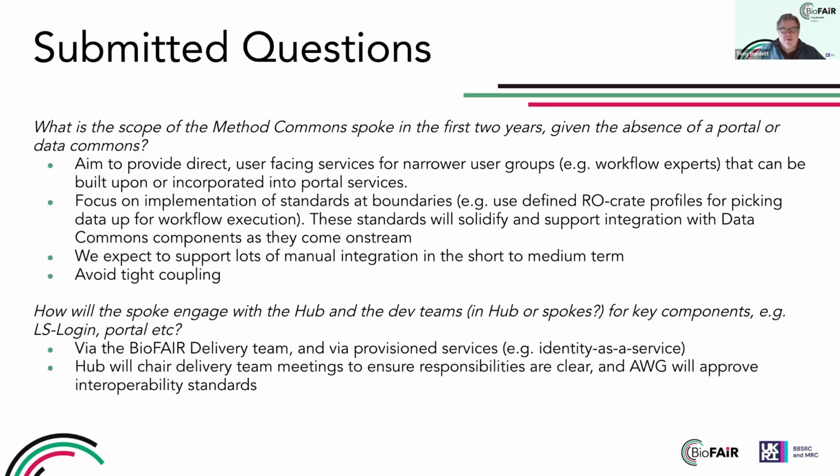This touches on the timeline of delivery schedule. So rather than set a firm deadline for the data commons that may well sail past, I think we're trying to create expectations and agreements about how the standards work. So the data commons can work to build up to adopt a standard. The Methods Commons can work to that standard as well, and that tries to avoid tight coupling so that the data commons can be integrated when it's ready.